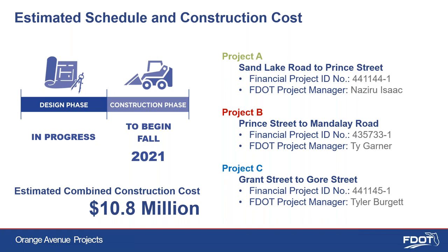In order to maintain the flow of vehicle traffic, construction will be performed during off-peak hours. Access to businesses and residences will be maintained at all times, and access points will be clearly marked for the traveling public. Advance notice will be given if there is a need for temporary lane closures. Additionally, pedestrian and bicycle accommodations will be maintained throughout construction.